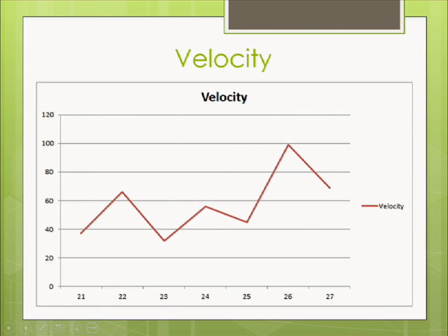Well, okay, our estimates were good. We didn't have a lot of unexpected work come into the iteration, but my developers only spent 50% of their time coding when I thought it should be 60%. So that means the next iteration, I'm not going to estimate for 60 hours. I'm going to bump that down to 55 or whatever. So when you break it down into tracking all these smaller metrics, it's a lot easier to find what the problem is and then adjust your larger estimate. So this is where over time you can get really good at this capacity estimate.